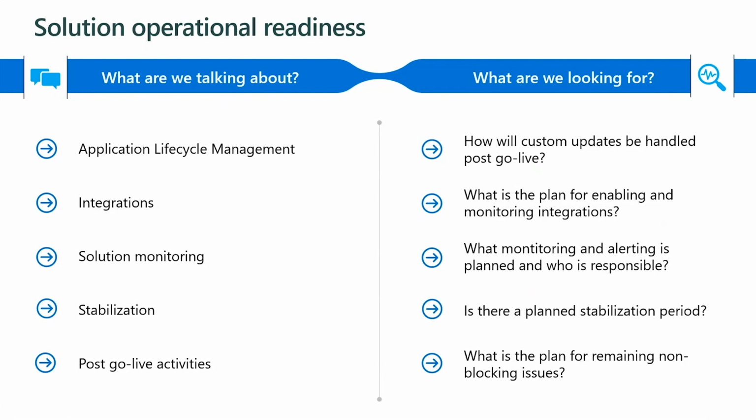If the implementation has integrations in play, this adds extra complexity to the go live and the cutover exercise. How these integrations are monitored and what to do if there is an outage or errors should be pre-planned. While Microsoft do monitor the cloud solution, in general, it would be smart to plan your own monitoring and have alerting in place. Make sure the right responsible parties are notified if something needs urgent attention.